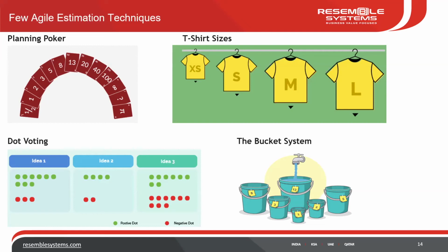And a user story. People do it in different ways, but ideally the Scrum team, which is the product owner, the Scrum master, and the team, gets into a meeting room. They have sticky notes where the product owner writes the user stories. He says, okay, the customer wants to add a wish list. This is one user story. And the other user story is the customer wants to see his wish list later. That's a second user story. So there are two user stories.